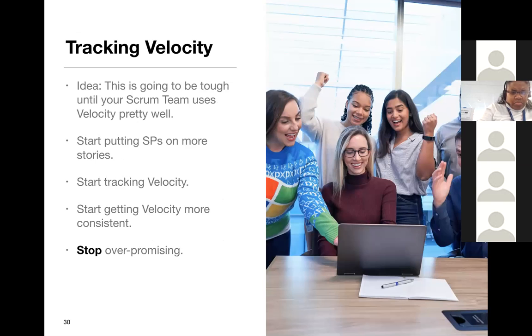Some companies are not, and some Scrum teams are not, tracking velocity. So I think that's going to be key. The real proof to the value of a full-time Scrum Master, to me, is in the increased velocity. There are other things, the happiness, the morale of the team, the quality, those kinds of things the Scrum Master would have an influence on, but particularly the velocity. The business value per story point, that's more an issue of the Scrum Master getting the product owner to make sure that happens. One of the key aspects of this is often teams are still way over-promising, and that's actually keeping the velocity lower than it should be. But anyway, the first thing is to track it.